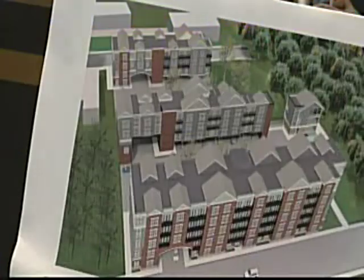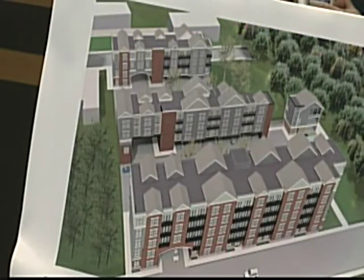Once you break ground, what's the build-out? Probably 14 to 16 months total, worst case. Obviously, it's better for us if it's faster, so if there's a way, we'll do it. And what was your projected start for breaking ground? Right now, we're looking at mid-July, if everything comes together, but it's all pending on a lot of WSSC paperwork that we've got to get back.